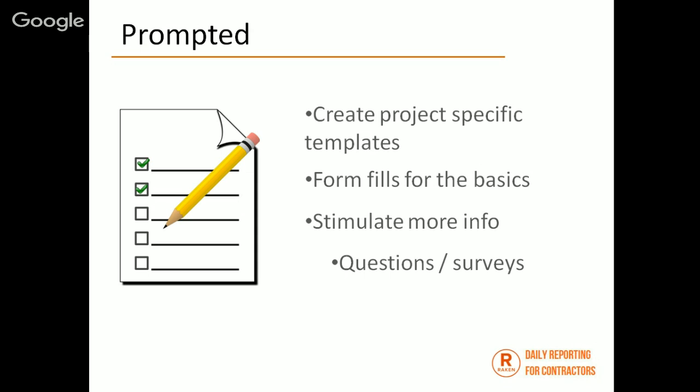And that can be a very simple thing. I know I created one one time was the 10 things for my superintendent. 10 things while walking around is what I called it. And there was just a little checklist that he was supposed to do while he was walking around, and he would check them off. And it was things like check safety railings and look for open holes. Okay. And so it asked little questions like, were there any safety infractions on the project site? Things like that. And then there was a spot for them to fill out information if there was something.